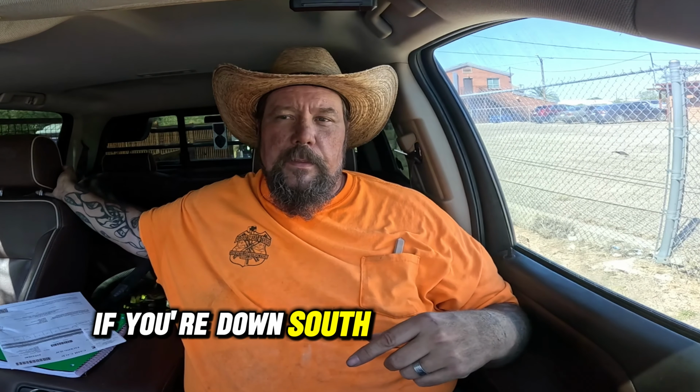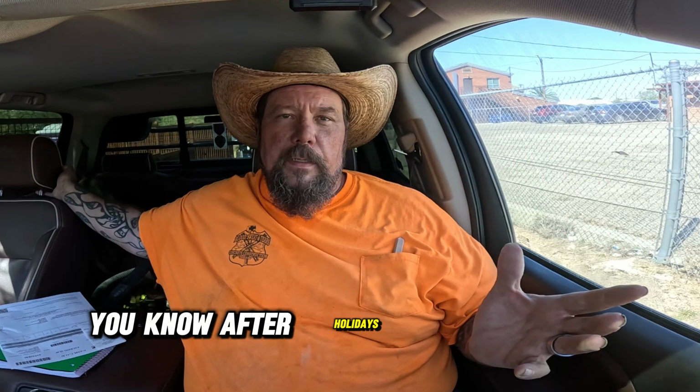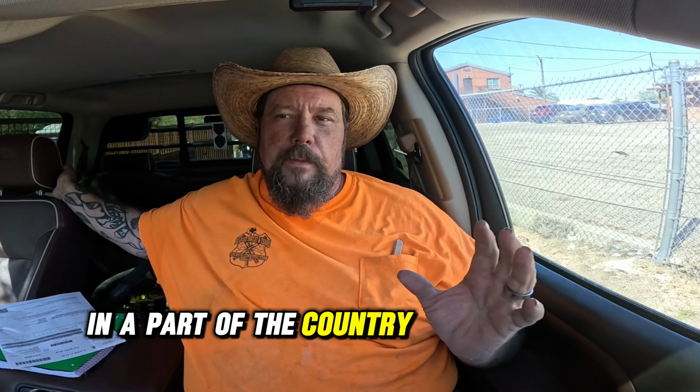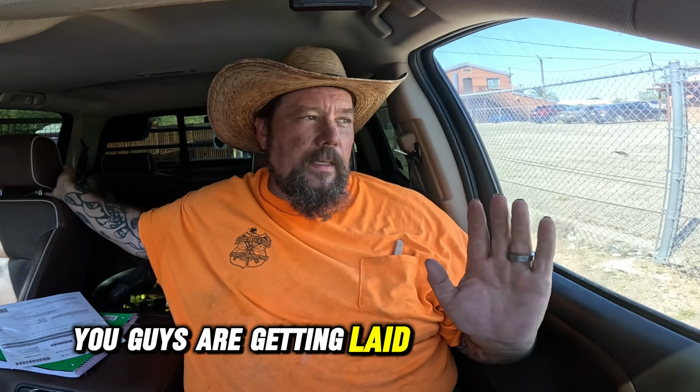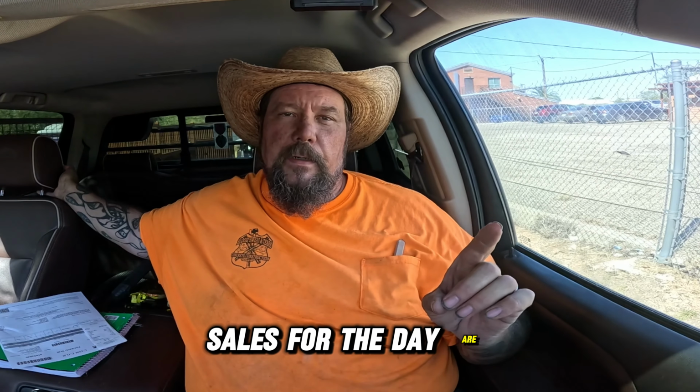Now, if you're down south here and you can work 220 to 240 days, after holidays and rain days and whatnot, you got to look at that number. That's kind of the norm in a part of the country where you can work all year. Up north, totally different. You guys are getting laid off or whatever. So you got to figure that into that number. And whatever that number is going to help you in determining what your minimum sales for the day are.